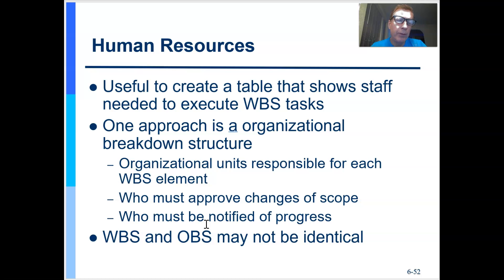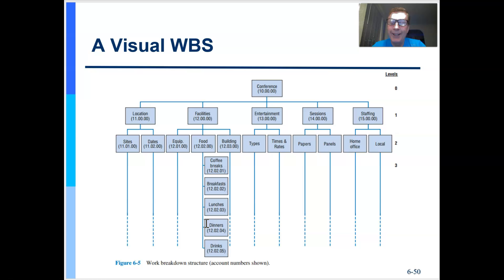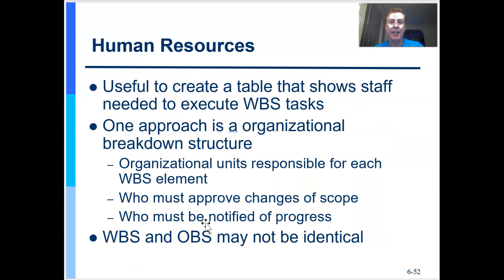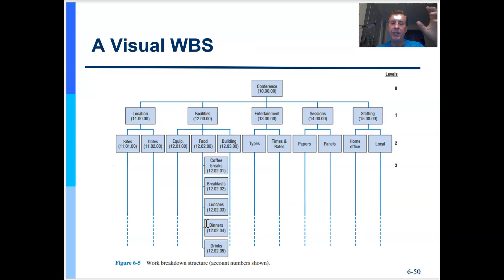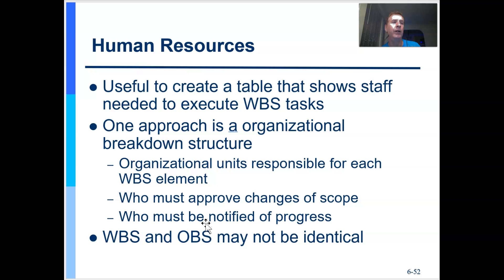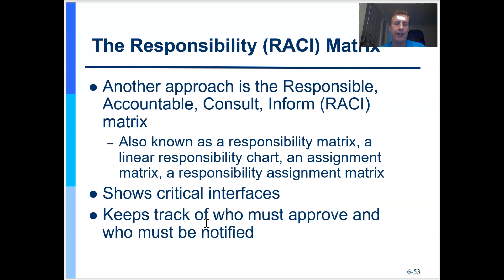The work breakdown structure is good, but there isn't a ton of detail there — where are my people? So you want to create a work breakdown structure dictionary, which has all the data that fills in those boxes. Part of the data in a WBS dictionary would be, for example, the human resources. Notice that a WBS looks very similar to an OBS — an organizational breakdown structure, or org chart. They're very, very similar.